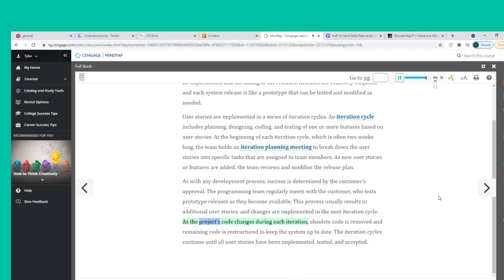As the project's code changes during each iteration, obsolete code is removed and remaining code is restructured to keep the system up to date. The iteration cycles continue until all user stories have been implemented, tested, and accepted.